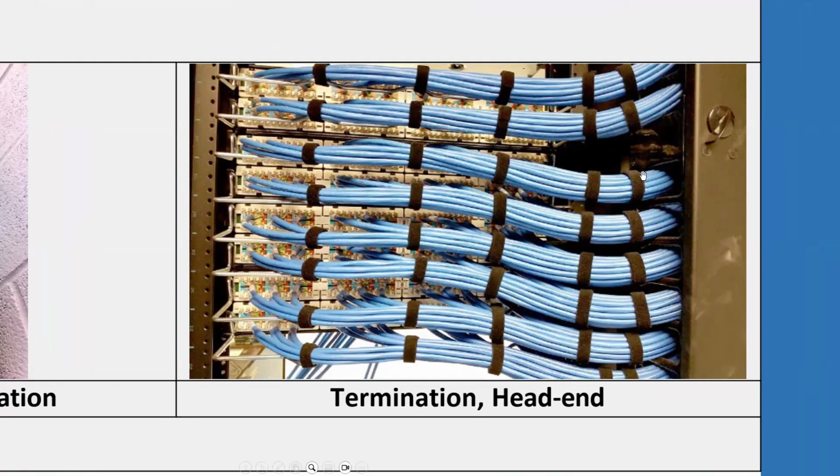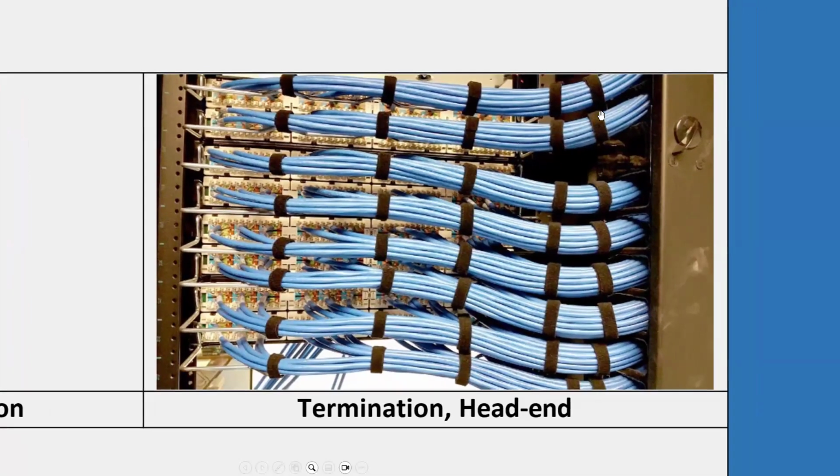So in this case, yes, you can still do a neat job, but it might take you slightly longer because you have to sort those wires by the number, and you have to take your time, be patient with that. You have to plan things out, count how many spaces you have, see what numbers on the wires you have. How can you rearrange? Are you missing any of the wires? Did you forget to pull one or something like that, right? So you're going to have to pre-plan the bundles.